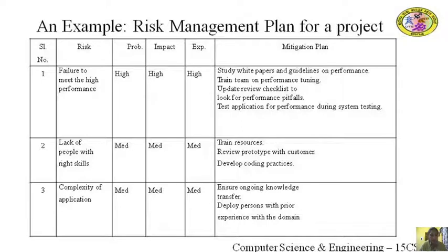Risk management planning at milestones can be redone for monitoring the risk, giving more attention to the risks listed in the project plan. During risk monitoring at milestones, depending upon the current situation and the impact of mitigation steps taken earlier, reprioritization may occur and mitigation plans for the remainder of the project may change.